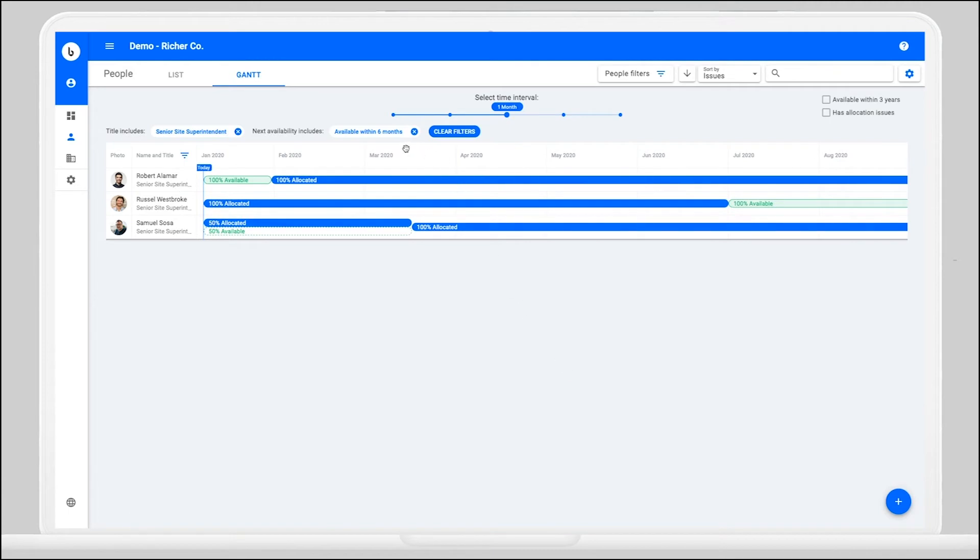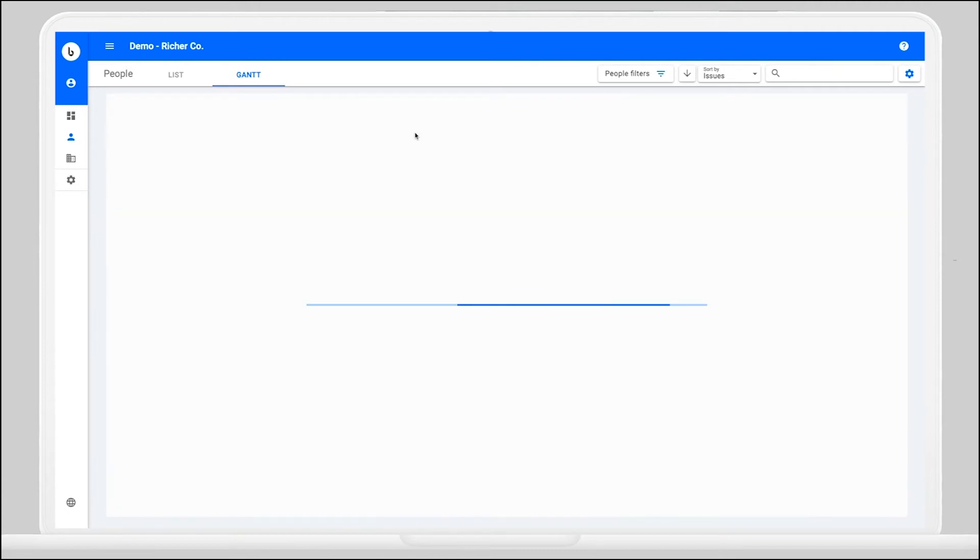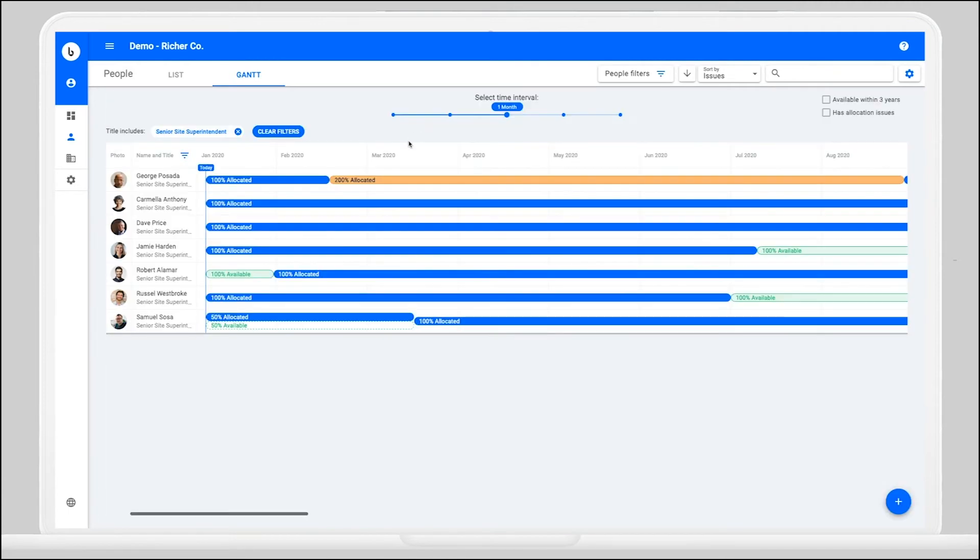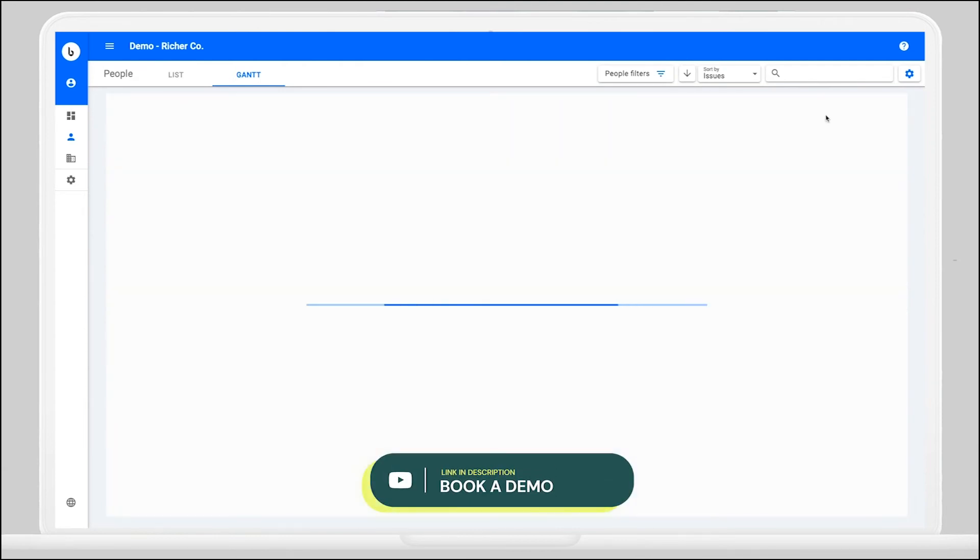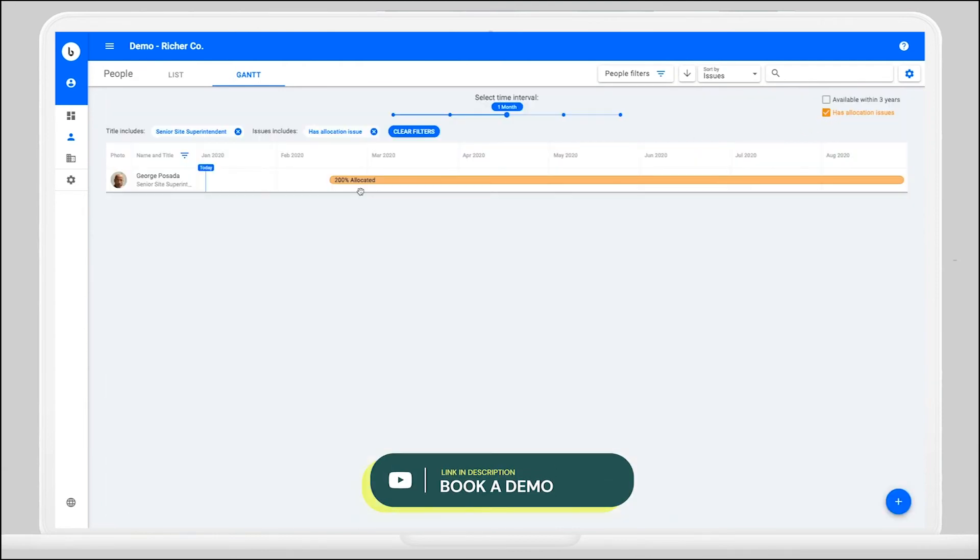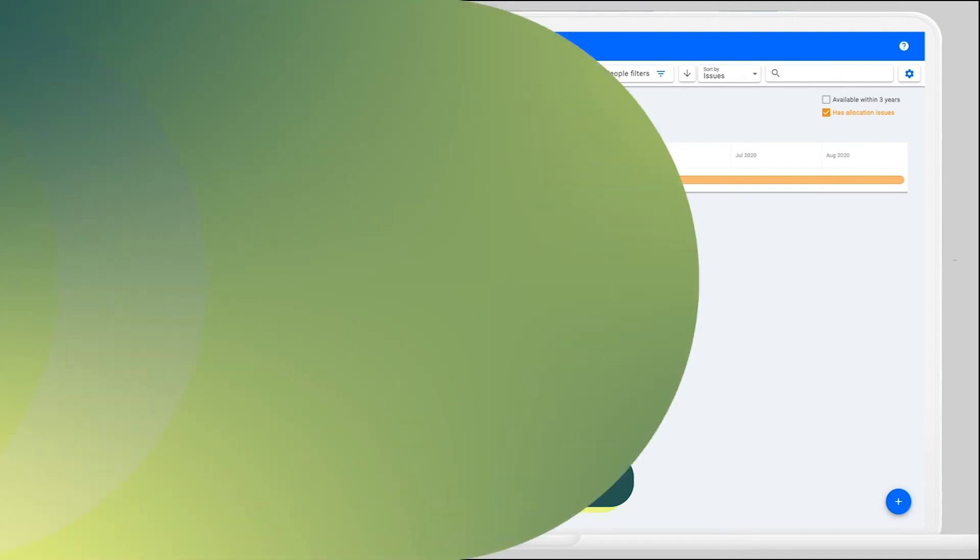You can clear filters with the chips at the top of the People Gantt and quickly add an allocation issue filter to isolate workers that have been over allocated to stay ahead of scheduling issues.